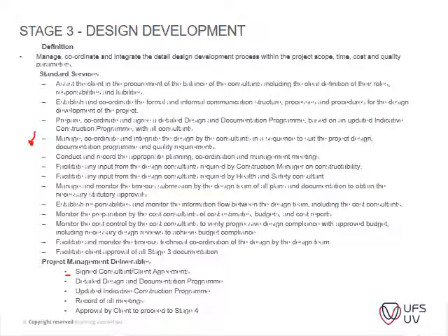Anyone that comes on board again, or if anything has to change, if the scope changed maybe, or something like that. Detailed design, documentation, and program. So you update your program to incorporate all of this new information. Maybe you've learned that the procurement process from the client has a certain amount of stages, like stage 1 is maybe the budget approval, then it has to go to someone else for approval. Then you can actually increase the accuracy of that.